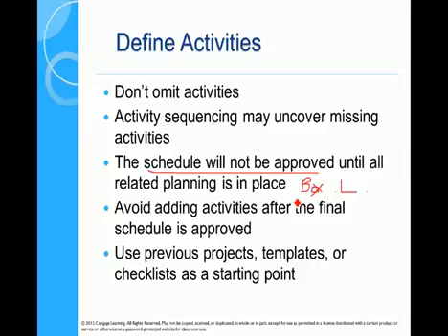So the planning is quite iterative. You start off with the initial schedule, then you look at reality, you look at the resources, you look at what financing requirements are needed, are there any particular constraints on those resources, what quality metrics are we recording, what impact does that have on the schedule. So you almost go around, you go from the schedule, you go through all the other planning processes, which then recreates a schedule, which then might affect the other planning knowledge areas, which then recreates a schedule, and eventually you've got to come out of that loop and come up with what we call a baseline, the approved schedule, of which everything that occurs in the execution will be measured against.